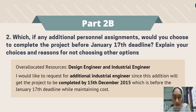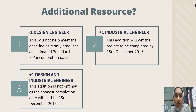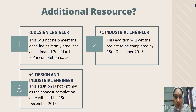Next, to help meet the deadline, the director is also willing to add personnel to the project. Based on the current resource sheet, two resources are over-allocated: the design engineer and industrial engineer. There are three possible options. The first option is to add one design engineer, but this addition only produces an estimated completion date of 2nd March 2016, which actually exceeds the project deadline.